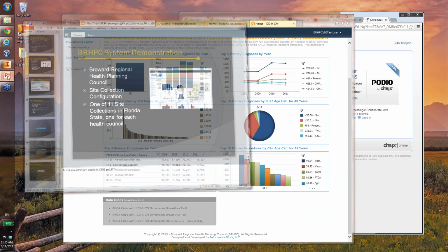Key lessons from the implementation. I shouldn't underestimate the role of the project champion. There has to be somebody in higher management who understands the need for BI, gets involved, and removes all kinds of obstacles. You also have to make sure that you configure the system from the beginning to be scaled out, because you never know; usually such systems scale out very quickly once they show advantages.